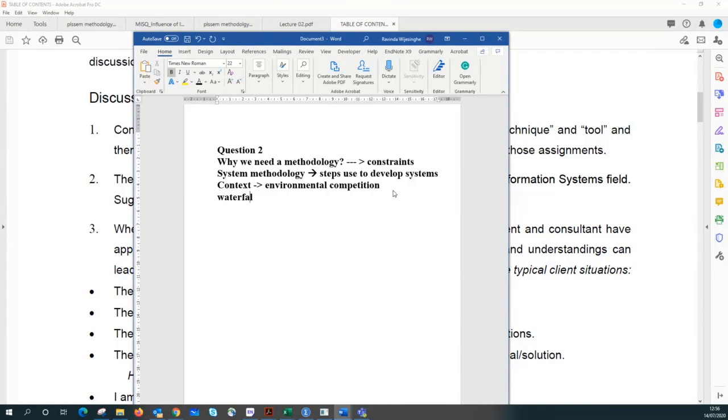So we have a waterfall approach to develop the system. What do we mean by the waterfall approach? The six core processes in the system development life cycle flow like water, right? One after another. We first clarify the problem and then develop the complete specification, and then we design and then we implement, right? We are not going back in the waterfall approach, because the problem is straightforward,